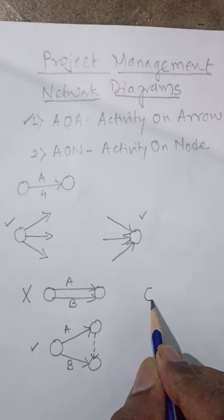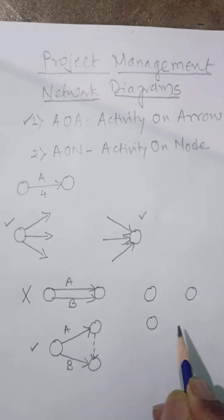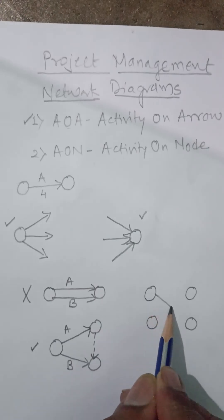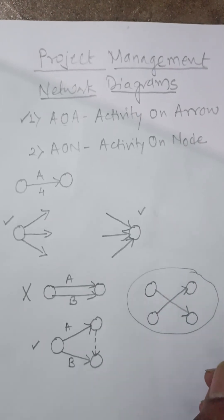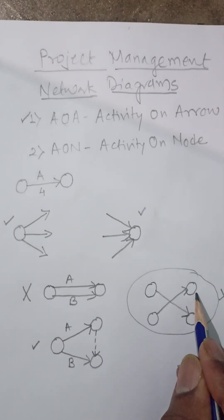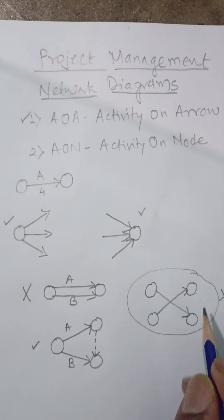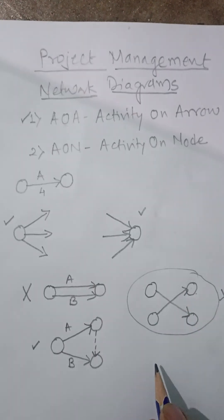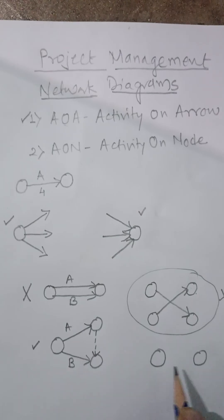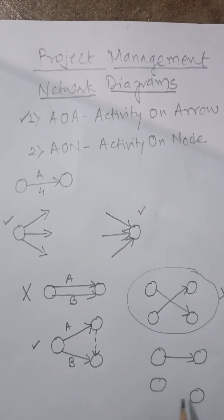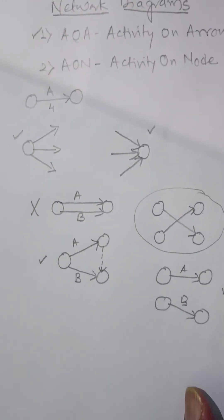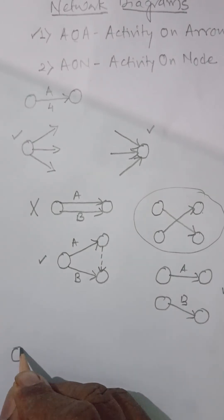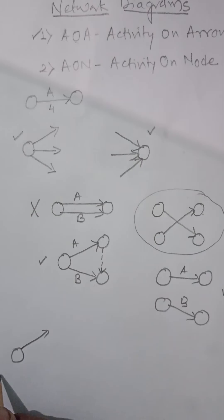You should also avoid the crossing of activities. If activity A and activity B cross each other, that is the wrong way of drawing them. Instead, change the position of one of the nodes so that the two activities are shown separately without crossing each other. This is the correct way of showing two activities.